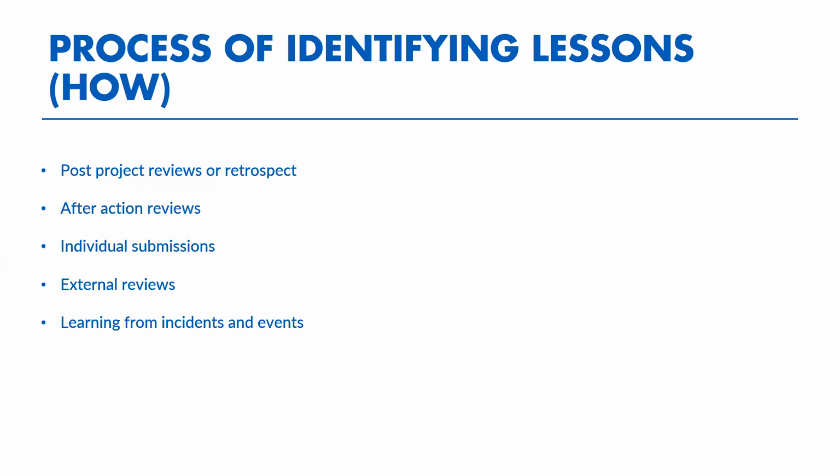So, for example, I work within the Disaster and Emergencies Preparedness Program. One of the lessons that we have identified is that collaboration, which is one of the pillars of this program, actually takes time. And therefore, the recommendation is that we need to factor in more time. We need to give the projects more time at the inception phase.